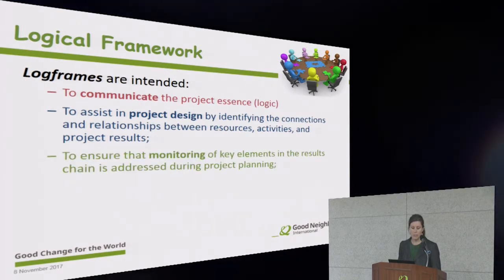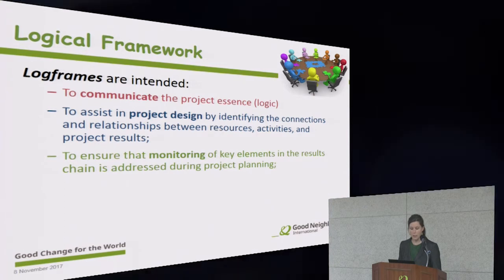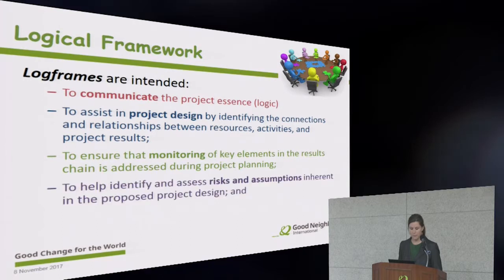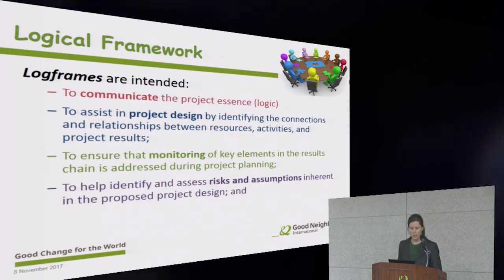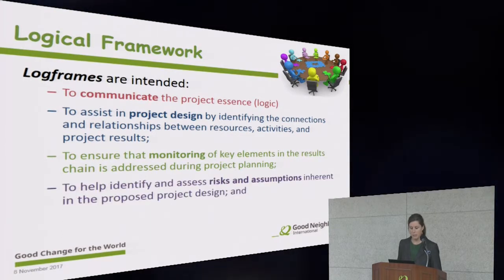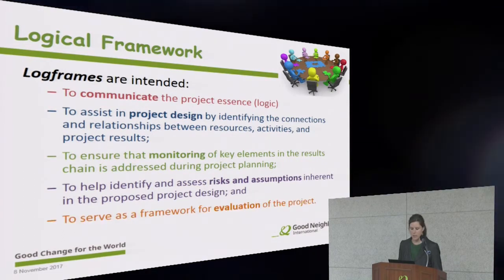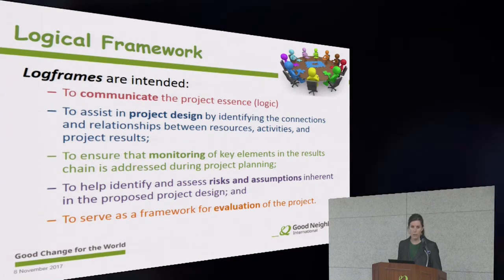Log frames are intended to ensure that monitoring of key elements in the results chain is addressed during project planning. They're used to help identify and assess risks and assumptions inherent in the proposed project design, and to serve as a framework for evaluation of the project.